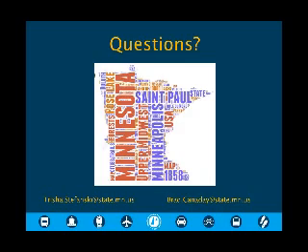But again, that's a good way to go if you're looking at getting something kind of in the middle, I would say. So you're not as high density, and it doesn't take as long maybe to process it, but you're not looking for the real accurate information, if you're looking for planning level. Yeah, you got to use the high-end stuff where you're looking for under 500ths of a foot. The other thing too is, figure out what you need, figure out what accuracy you need, and then put it together in an RFP, and the people will pop up out of the woodwork to come up with what they can do for you.